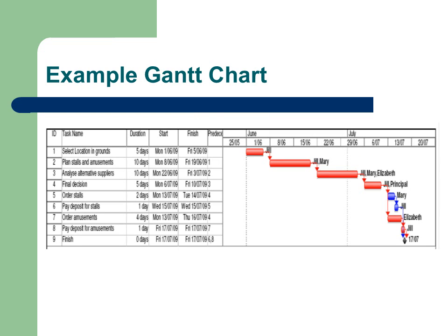The Gantt chart. This is the most common form of illustrating a schedule. It is a two-dimensional representation of the project schedule with activities down the rows and time across the horizontal axis. It's used during planning, resource scheduling and status reporting.